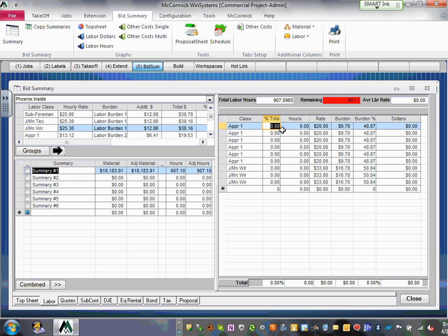So I'm going to divide the time needed on the job by the 9 of them. They're all going to be there, and each one of them is equally going to do a percentage of that job. So why don't you guys type 11%? Since he's there with everybody, I'm going to allocate 11% for him. All of them are 11%, except at the bottom. This is the percentage of the overall job. At the bottom, it should add up to 100%, so I need to give this one 12 so it adds up to 100%.